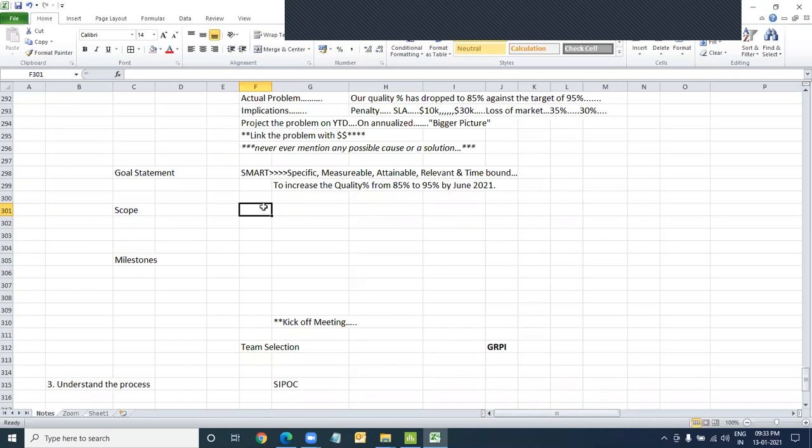Sir, can I add in a practical way? Yeah, please do. Sir, actually, when group directors sit, we call it a murder board. In that, they have different opportunities in their hand, and if they have an opportunity with 19% IRR, 18% IRR, 17% IRR, and your project is giving 15 or 16% IRR, you get it.